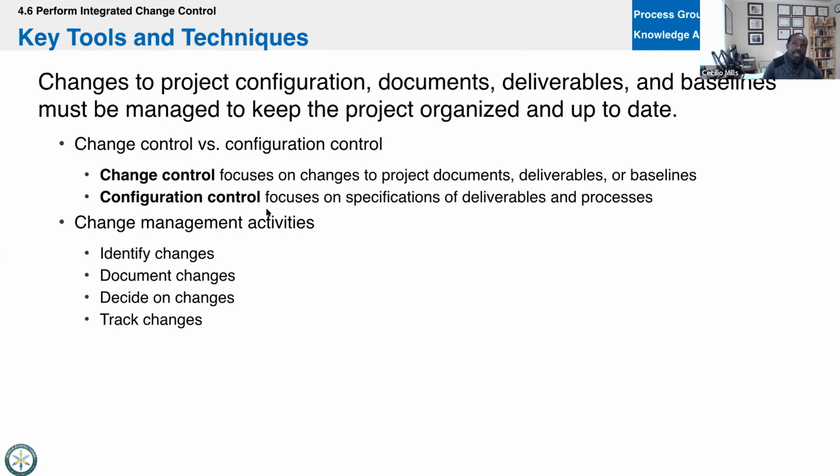You're going to get questions on the exam that describe the fact that a change is taking place, and now you're updating documents. The configuration management plan will help you with that. And you could have some tool like SharePoint. When you update a document, right, it knows who checked it out and what the last version is, and you can roll back if you need to. That will be a configuration control tool. So that's going to come up on the exam. Just want to mention that.